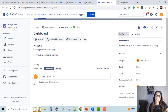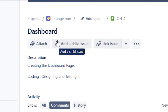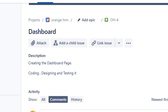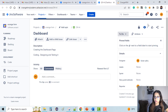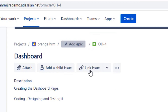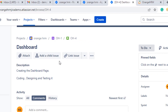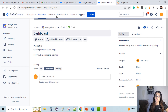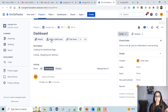We've understood that if we're going to create a new story, we can directly do it from the Create button or from the backlog section and fill in the important fields. Now let's say I add a child issue — I can also add an epic name here. If I want to add an epic, I select the epic which is already there, and this issue is now linked to the epic. That's how you directly add an epic. You can see the roadmap breadcrumbs show: project, epic, and the user story.